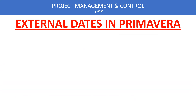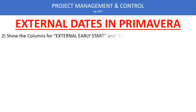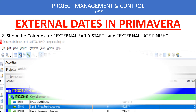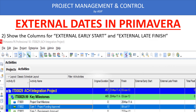At the same time, you can do one more thing. You have to show the columns for external early start and external late finish date in the layout. It will show you all the activities which are assigned these constraints.